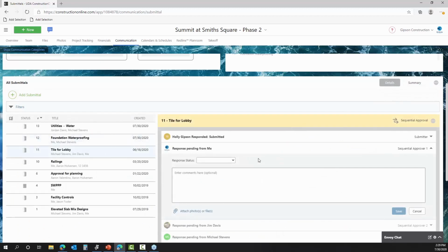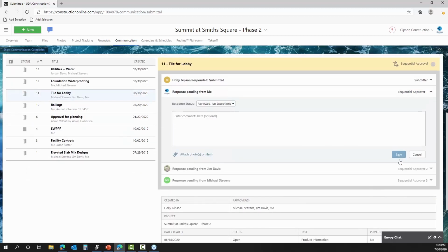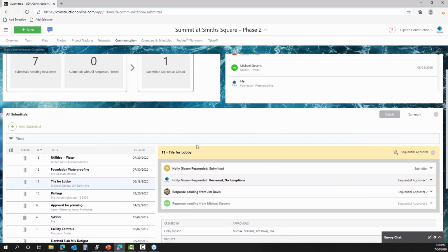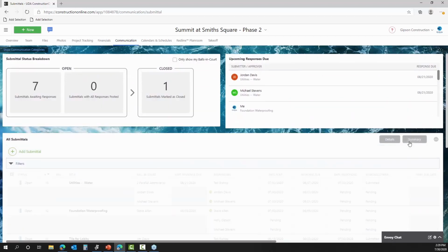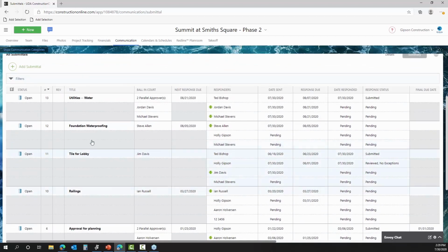approved. We're looking at some other response statuses, though, especially where next steps would be required, like revise and resubmit, for instance. That tends to be a pretty common response from what I've seen in earlier revisions of different submittals, and that is a signal for you to go ahead and just take the existing submittal and step through and generate a revision, which couldn't be easier.